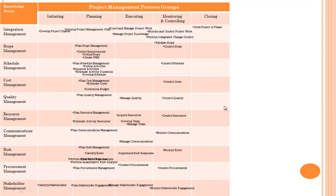Under process group monitoring and controlling, processes are: monitor and control project work, perform integrated change control; under scope management — validate scope and control scope; under schedule — control schedule; control cost; control quality; control resources; monitor communication; monitor risk; control procurement; and monitor stakeholder engagement.